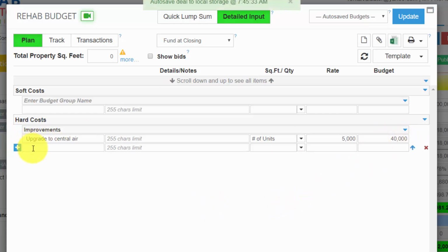I'm going to click add, and the other thing, I don't have the pictures and I haven't seen the property yet, but I can guarantee you that the bathrooms are outdated. There is one bathroom per apartment, and it's going to cost me roughly, and again, I'm just ballparking here, about $3,000 to fully update these bathrooms and make them really nice: replumb them, replace the tubs, replace the flooring, replace the vanities.